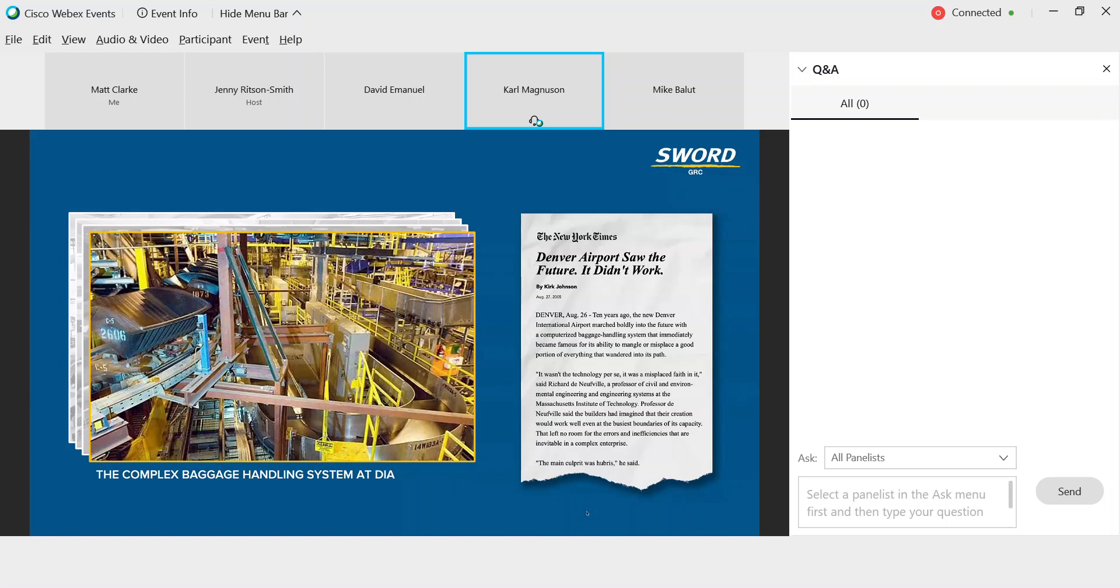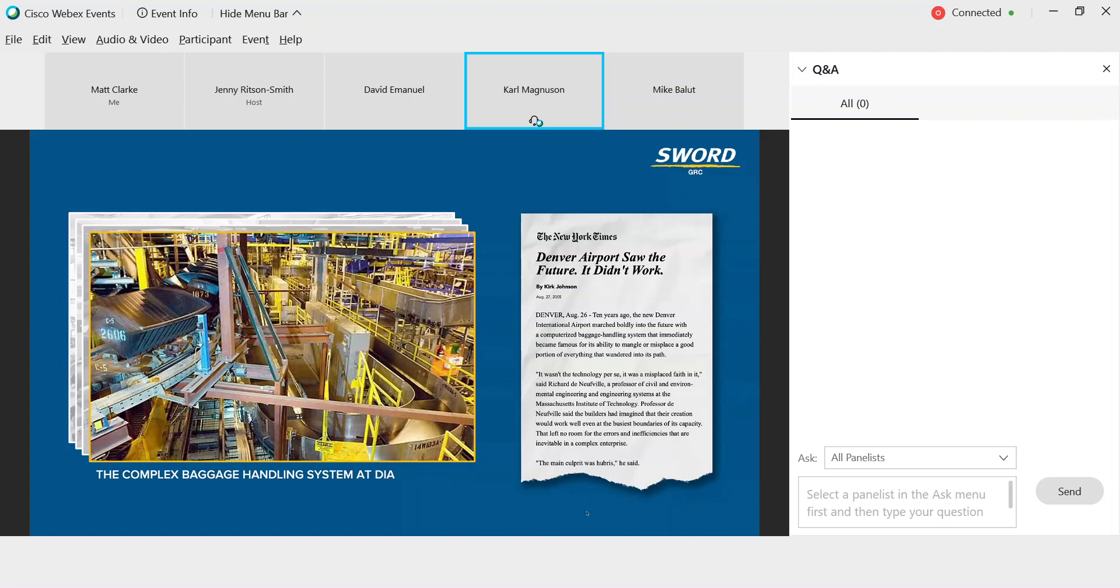We see contributing factors across both of these airport projects. Those factors include underestimation of complexity, underestimation of project duration and budget, changes in requirements, dismissal of advice from experts, and as one journalist put it, the tendency of these baggage systems to enjoy eating people's luggage. While we would hope that the industry would have learned from these prior airport projects, the opening of Germany's Berlin-Brandenburg Airport in October 2020 suggests that we're still making many of the same types of mistakes.